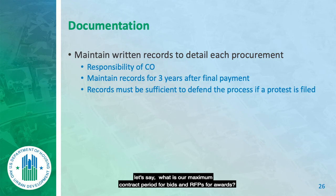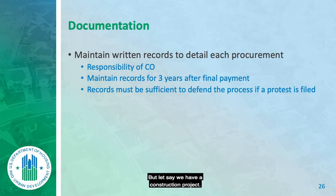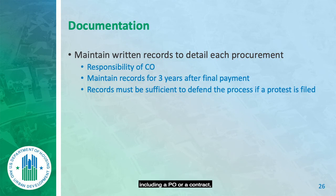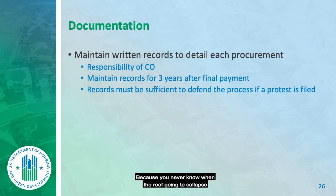The maximum contract period for bids and RFP awards is five years, except for legal contracts which are limited to three. For construction projects, I keep the file for that year plus three years after. But I never throw construction documents away — I either scan them or file them away permanently. You never know when a roof might collapse and you need documentation to protect yourself.